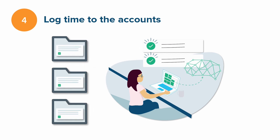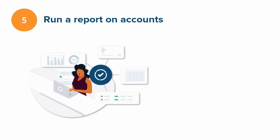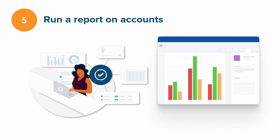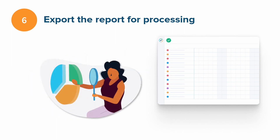This gives you the logged time data that you can use. After a project is done or some data is required, the account manager or project manager runs a report to see how much time has been spent on specific accounts, or on account category types like capitalized or billable. They export the report, usually as a spreadsheet, and hand it over to the financial team. They could also use Tempo's APIs to develop integrations to pull this account and time tracking information.